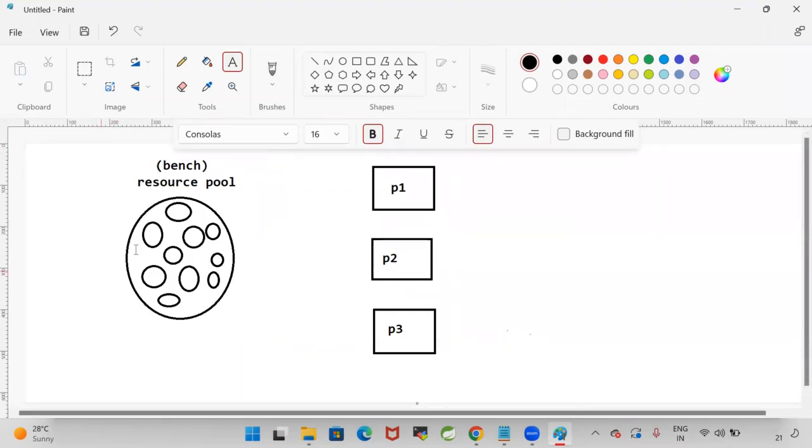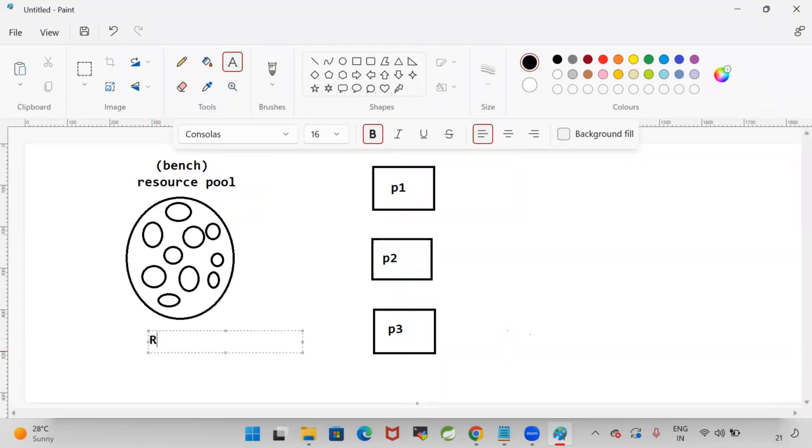They recruited them and kept them in the resource pool. Now, when there is a requirement in project 1, the project manager will tell the resource manager, who manages this resource pool. One HR will be available for the resource pool. That HR is called RM, resource manager.